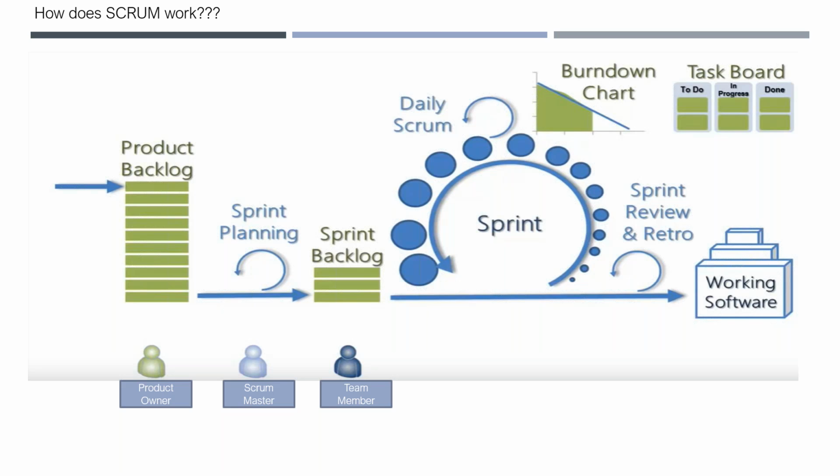Once you plan it, you will get a small subset of the requirements into your backlog. It means you will not develop all 100 requirements; you will only take some 10 requirements. These 10 requirements that are going to be developed in a particular sprint, you call it a sprint backlog. So you understand, sprint backlog is a subset of requirements from the product backlog.